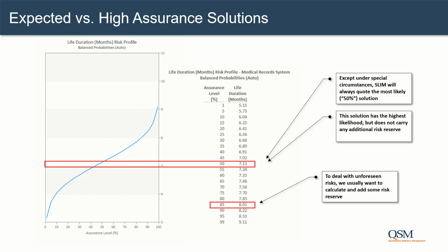Even though we calculate that this project can be completed in 7.13 months, we commit to the customer to deliver in 8 months. This gives us about 3 calendar weeks of reserve to respond to risk which might threaten the schedule. Without this risk reserve, the moment one problem compromises the schedule, we are in danger of overrunning and not fulfilling our commitment.